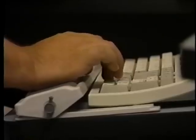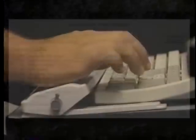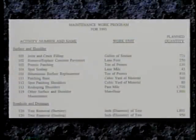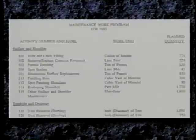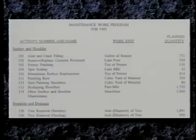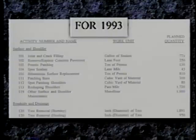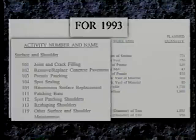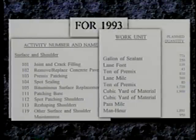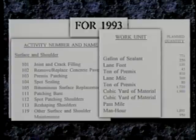The result of each method is the same — a work program showing estimates of the kinds and amounts of work to be done. A typical work program identifies the organization unit, the time period for the work program, activities and their reference numbers, a work unit for each activity, and the planned quantity for each activity.